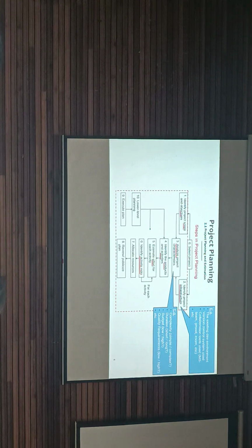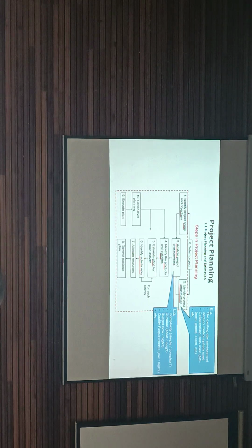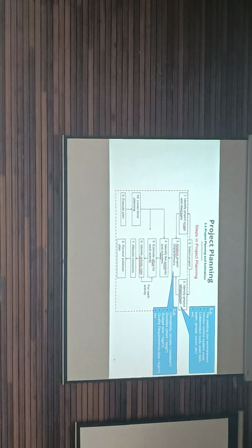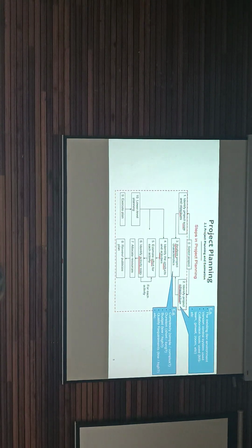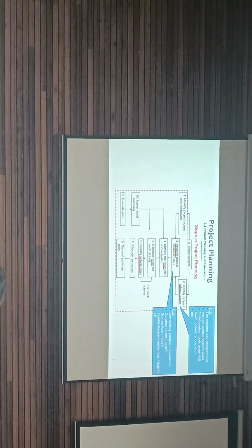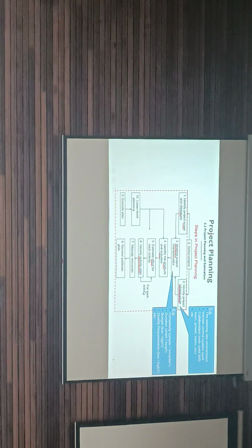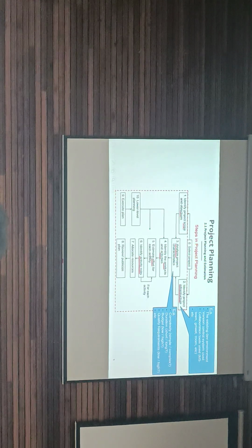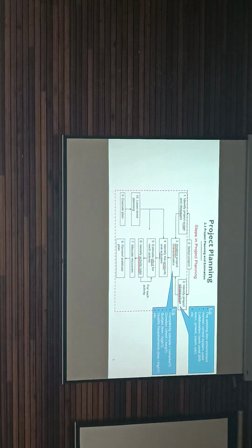I think you also have done this in your FYP. You have many activities. So how much effort is needed to complete the activity? You may put down the number of days. Identify activity risk, so you know what are the things you have to do, what's the risk. So for each activity, you have to estimate the effort and the activity risk. Do this, and this, for each activity.